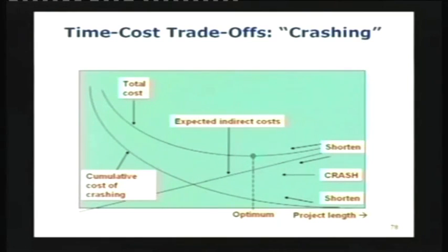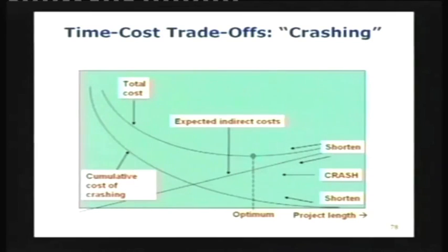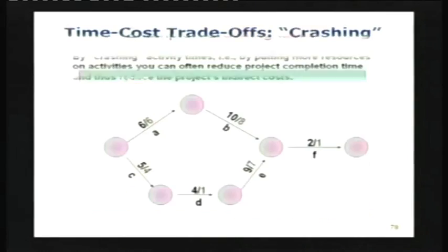Yes, cash flow in future. Your revenues start earlier. So that's the trade-off. I can spend money on the project, I can compress things, and I can start my revenues coming in early. So in fact, you'll see this is what is done whenever you're trying to optimize crashing.